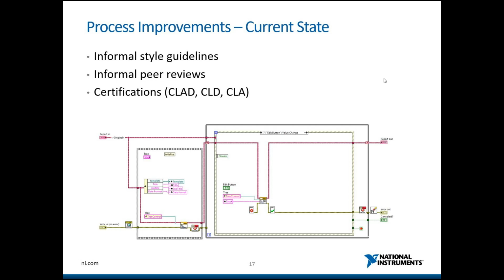But yes, definitely watch that. And Steve gives things scores. He has a matrix where he gives stuff scores. At some point, he just says either I'm not going to do it, or there's no way I'm doing it fixed price, we're doing it hourly. So that's one way to mitigate risk, because if you do it hourly and it takes you longer than you expect, you're still getting paid.